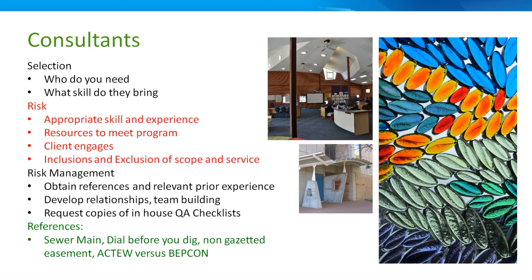Because many, many times, and I tend not to work so much for project managers, we mainly work under lump sum or construction management, where we employ a builder and they do the trade package tendering and we manage the rest. And we report to the client. Because then you fit into their schedule, and so often you become like a subcontractor.